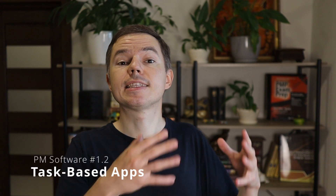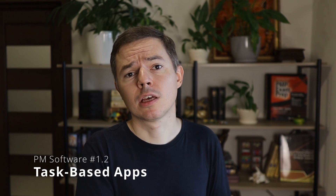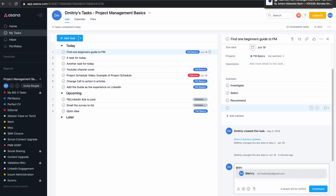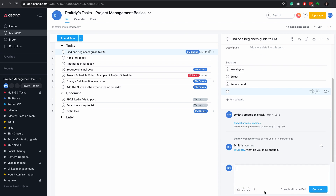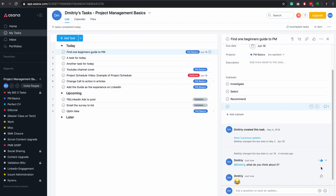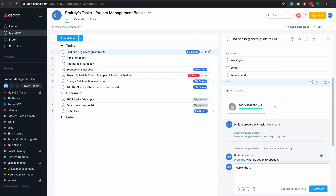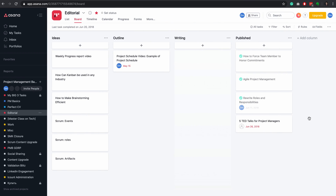The next group is task-based applications, or agile boards. They are usually much simpler than lifecycle applications. They are based on tasks that you assign to different team members, and you track all the work and communications below each task. They also allow you to visualize work by creating Kanban or Scrum boards. The most popular apps here are Asana, ClickUp, and Trello.